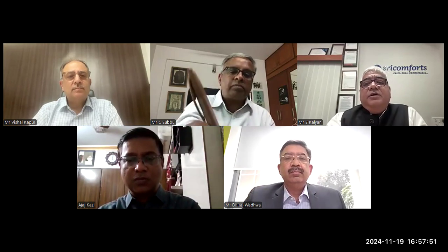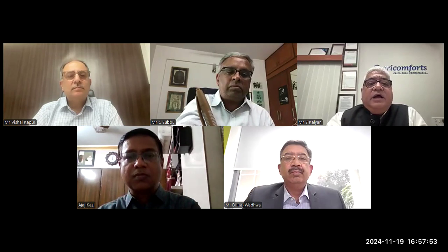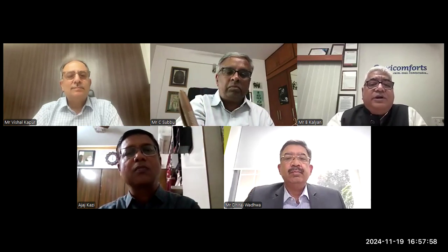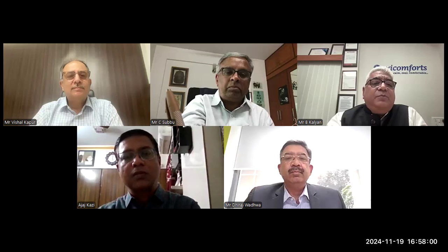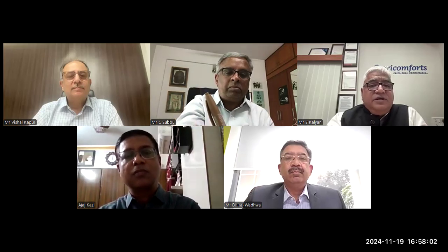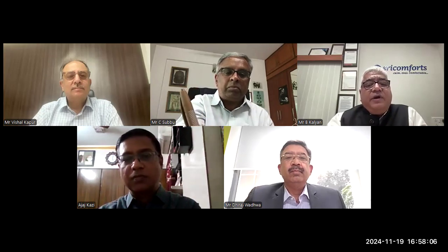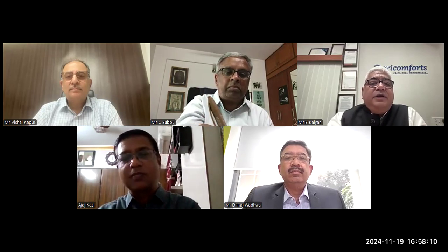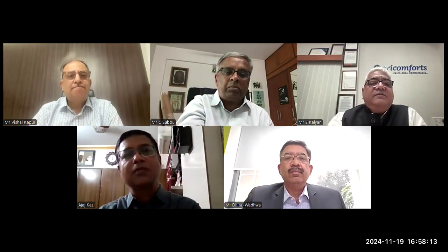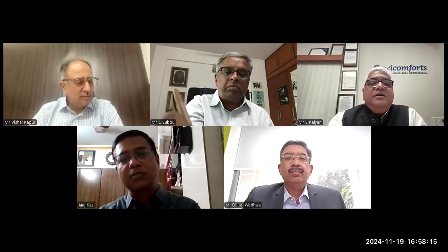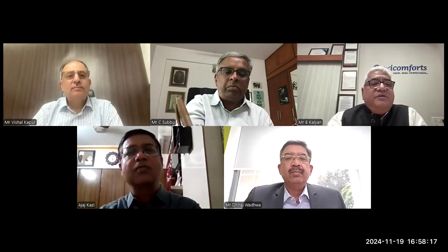Basically, my point is most of the projects are happening somehow in time. I don't want to shorten the term, somehow in time. So finally, the last point is the testing and balancing and handing over. These points are totally faded away. Most of the time, you get the power at the last minute, you get the chiller at the last minute, or you get all these things at the last minute, because somehow the customer wants to enter the premises.